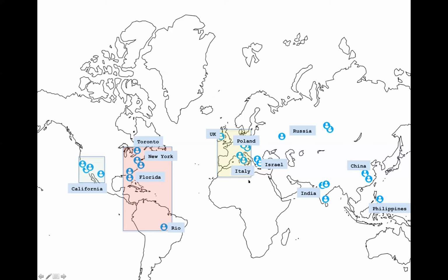Remember, your Agile team needs to be small. So you don't want to bunch everybody who's in Europe into one big giant team. You want to be smart. Using time zone as your consideration would go a long way. So in this case, you can see the Europe team is split in two teams. In one team, you have the Western European, in the other team, you have the Eastern European engineers. And then on the Asia side, you can have a team in India and Russia together in one team. And then, same thing on the Asia Pacific region.